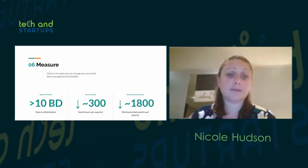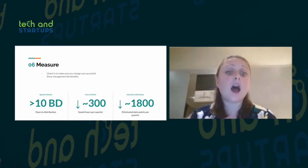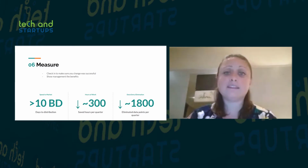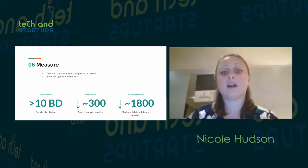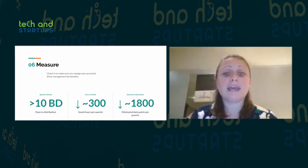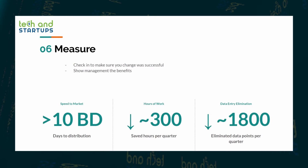So from our project perspective, we were able to improve our speed to market. Our goal had been to be under 10 business days for distribution, and we got some down to as low as 3 business days, and our most complex items still stayed under 10 business days. So that was a huge win. We also saved over 300 manual hours per quarter of the team that had been doing the manual work, and we were able to eliminate over 1,800 data points that were entered on a quarterly basis by automating a lot of that data. So this is what we were able to show to our leadership to say, we've done a good job, we've been successful.